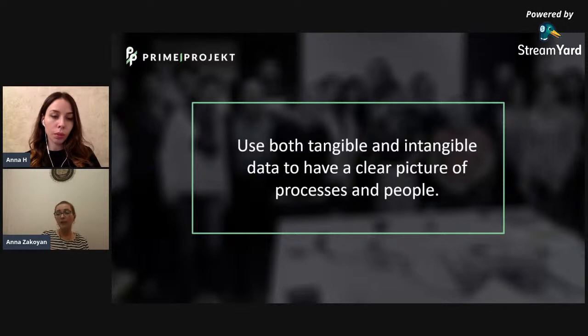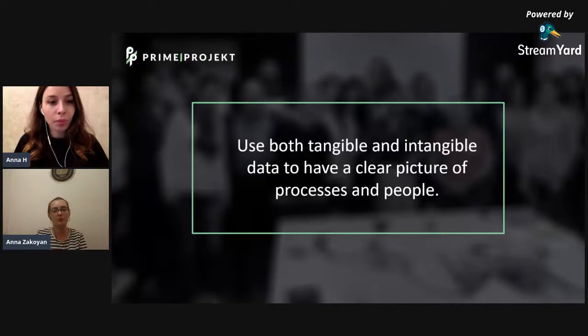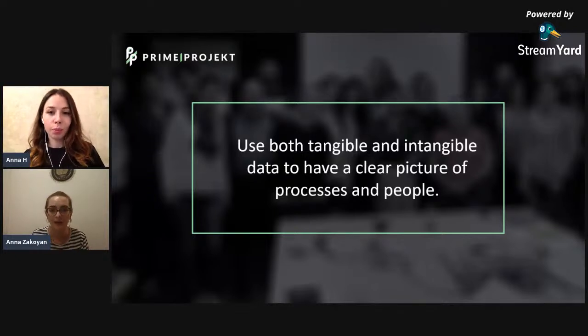Regarding velocity, the last thing I want to mention is that velocity is not for evaluating team efficiency. It is just for planning reasons. So let's just face it. That's why sometimes when people come to us and say, we want to track individual velocity, I always ask one question: why do you want to do that? What is the reason? If you want something, then just tell us and we will try to understand whether there is another way of doing it. So yeah, those were just some thoughts that I had now.